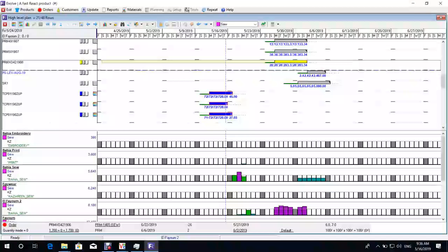Okay, so I've just associated that again. When I associated that timetable to the order, it immediately gave it this long tail again to signify that we now have critical path events to follow up on. Again, a month before we need production start, we need to have done our PP sample, sent it out, and got our approvals.